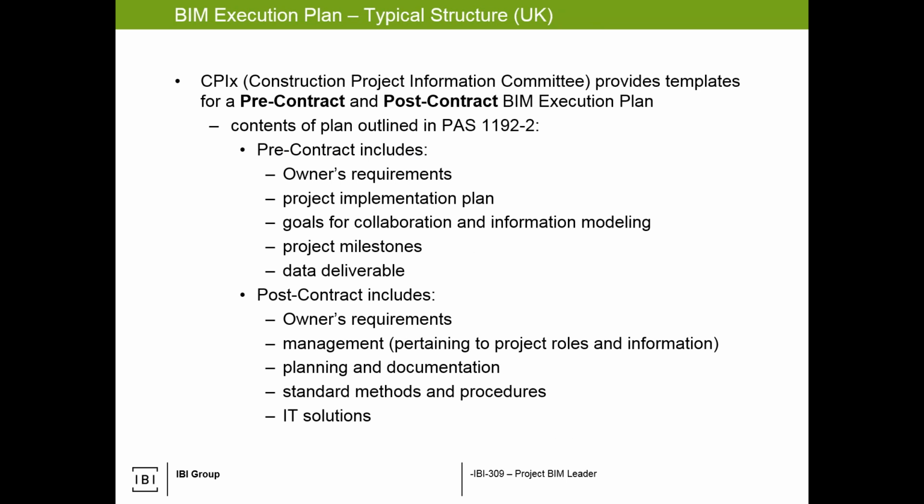So the pre-contract is basically saying, look at the owner's requirements, understand what the goals are to collaborate and share information, what's the data deliverable and the milestones, and then have that as a framework so you can then bid and tender the project, win it, and then post-contract plan the remaining contents of how you're going to do it. So very logical to that. What I like about the pre-contract concept is it says up front when you're bidding on projects, be cognizant of what the BIM needs are. And if you can understand that, then we can actually make that happen and plan accordingly, removing hopefully some of the surprises that would be in place.